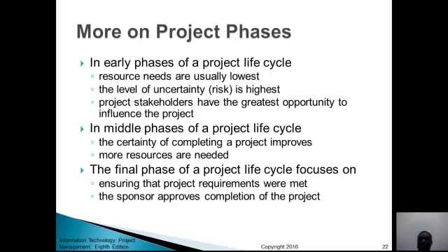When the project is at its initial stages, that is where the stakeholders can actually influence it, because when you build it almost to the end, you have less option of changing. But at the beginning, if you have anything, that is where you can actually influence the project.